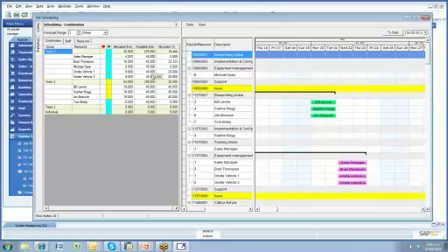But I could go into a staff member through their employee record and change that to say, well, actually, Michael doesn't work Wednesdays, or maybe he works late on this day and finishes early, that kind of thing. So this is letting me keep track of how much available time I have for a person and what time I've allocated them in my schedule already.